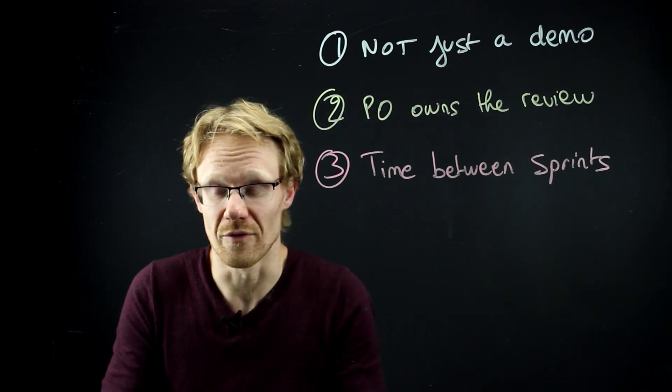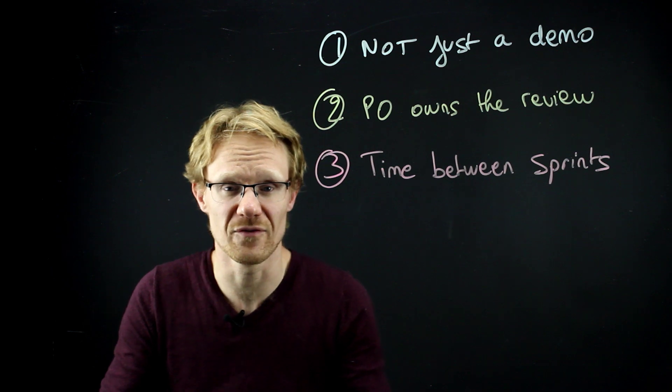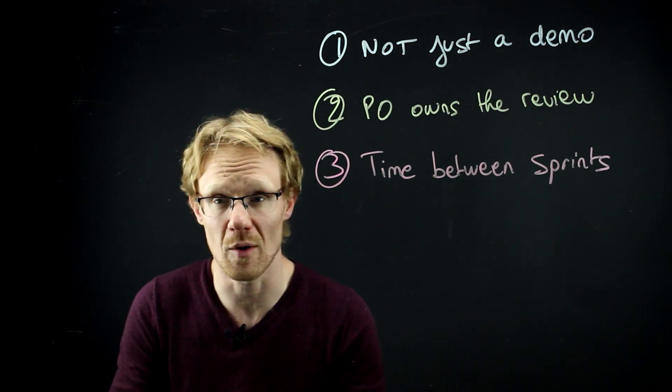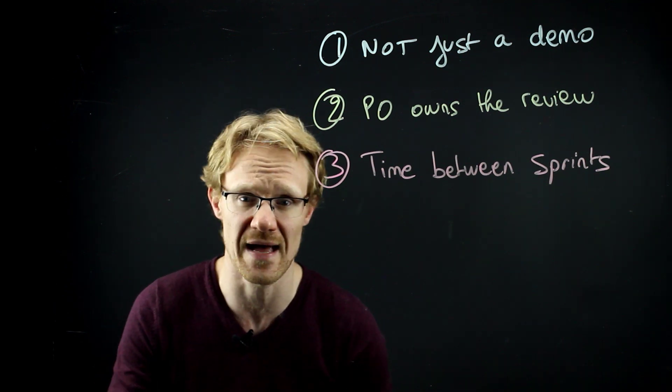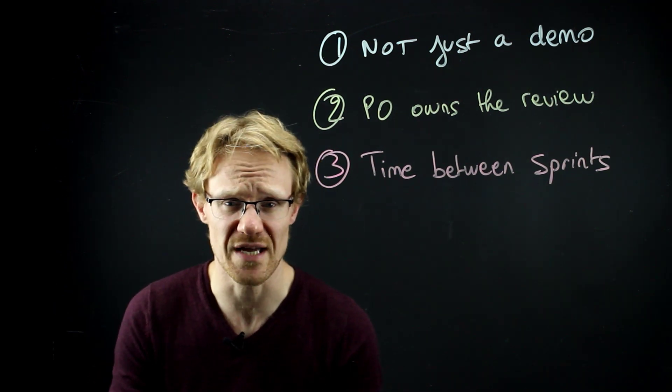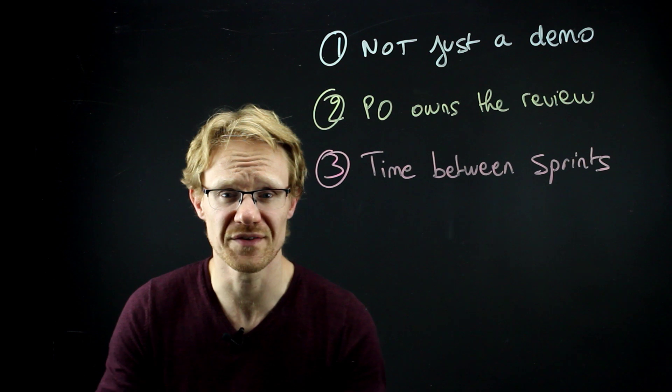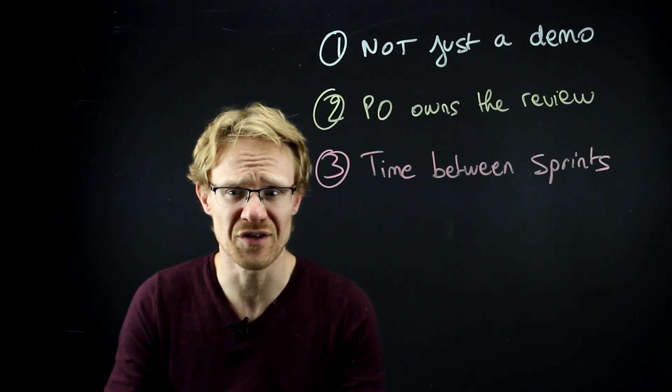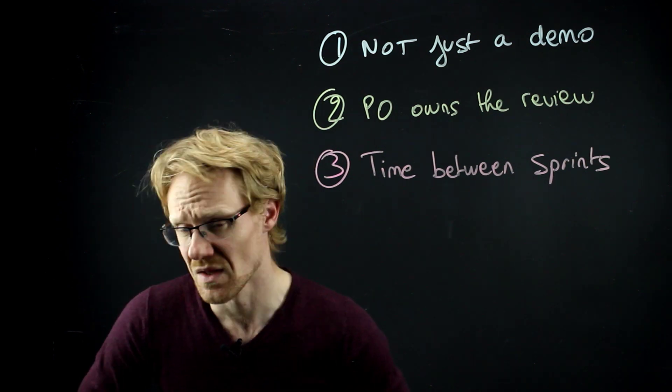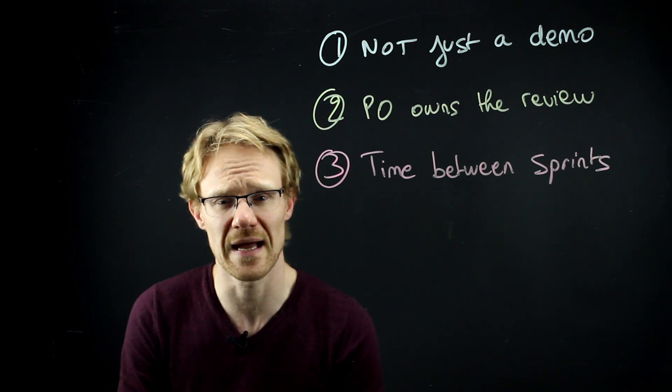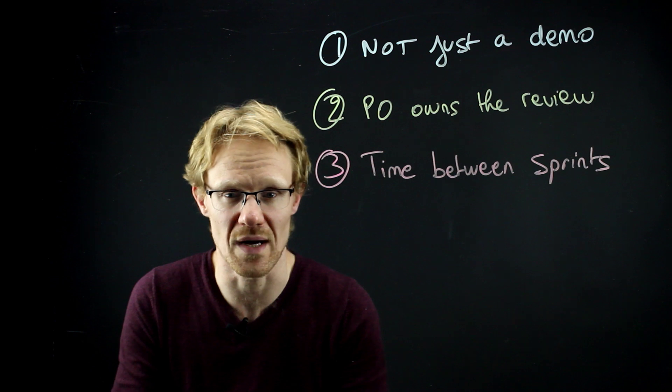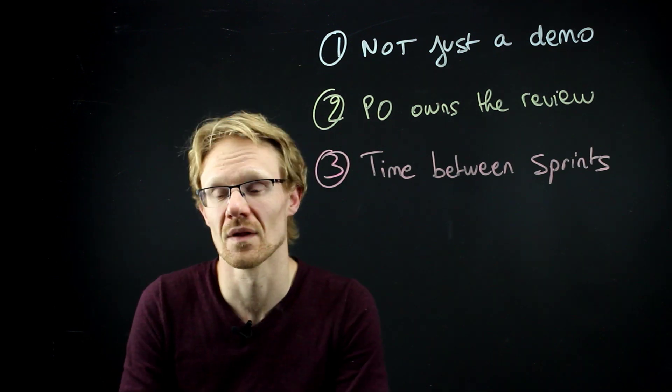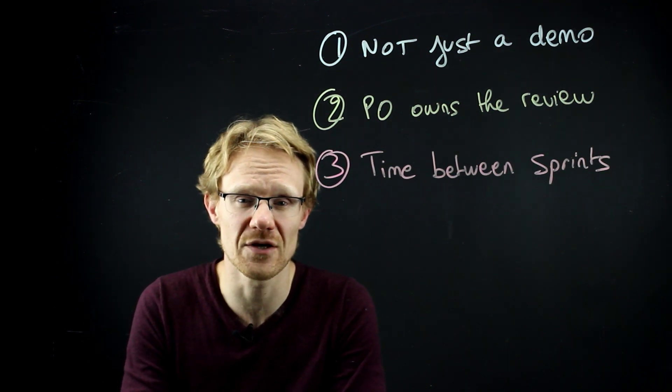At the sprint review, the product owner and the development team should be full of ideas, right? They should have options in their head of what to do next, suggestions on how to improve this and that. That's a lot of things to digest. If you rush into starting the new sprint straight away, you'll have no time to digest all of this—no time to really understand the lessons learned, and no time to really evaluate what has been done during the sprint.